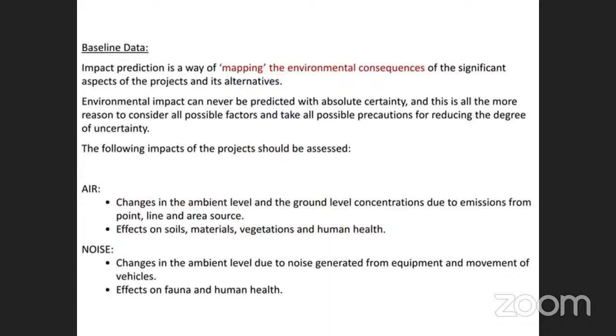Only National Accreditation Board for Testing and Calibration Laboratories, NABL laboratories, are established to assess the environmental impacts. The monitoring sites need to be selected, and the source of the pollution needs to be identified, taking the samples at the possible points and sending them to the NABL laboratories for the assessment of the baseline data process.